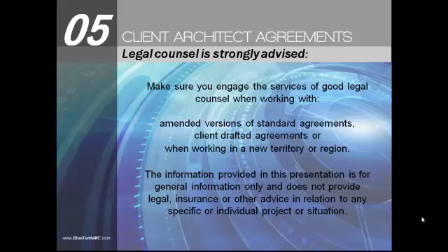So here's the catch. In Texas, pay when paid clauses are typically enforceable by law. However, in California, they are not.